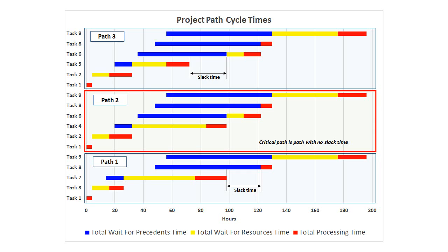Matter of fact, if you look up, you would see that task 8 is waiting for task 6 to complete before it can start. So we could derive from these graphs that task 8 has two precedents. It has precedent 7 and precedent 6. So that's slack time. Basically what that slack time is telling us is that it could have taken us a lot longer to do task 7 before we actually changed the project duration as the result of the start of task 8. So that's what we mean by slack time.